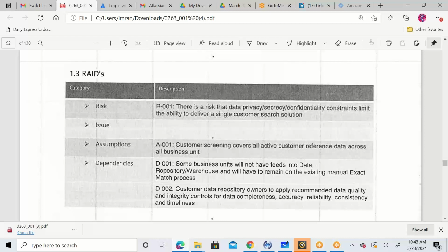Because IT teams mostly work as contractors, and if you give contractors access to your secure data, secret private data, client information, confidential information, they might misuse it. So it is the responsibility of the database management team that whoever gets access works within the limitations. That is one risk you will see in pretty much every single project; they will at least highlight it, they will at least write it down. That doesn't mean you won't be able to get access. Of course you'll be able to get access, but still it is a risk.